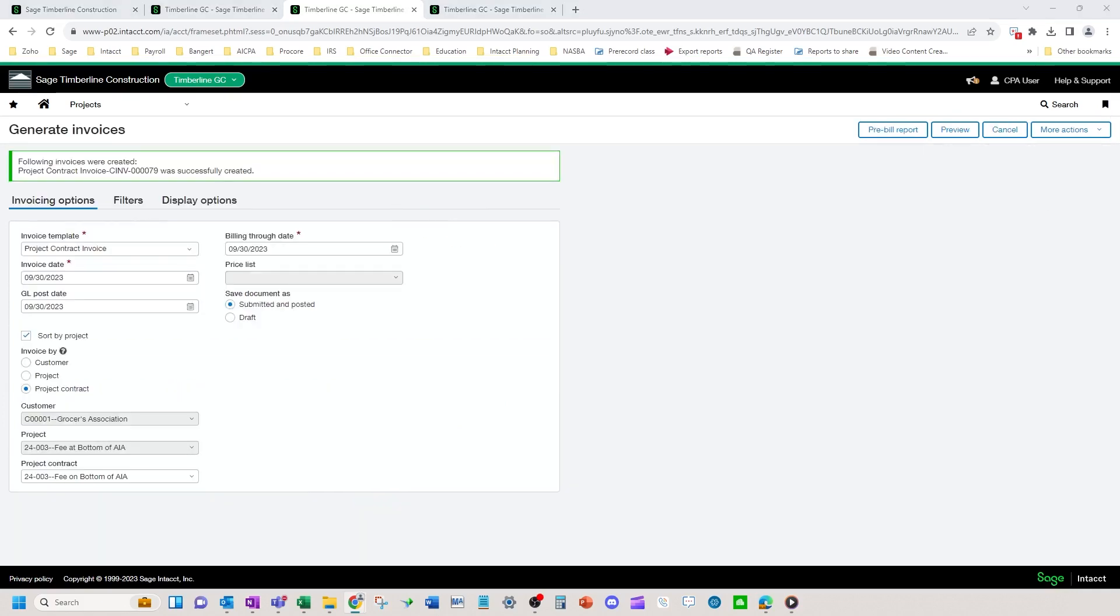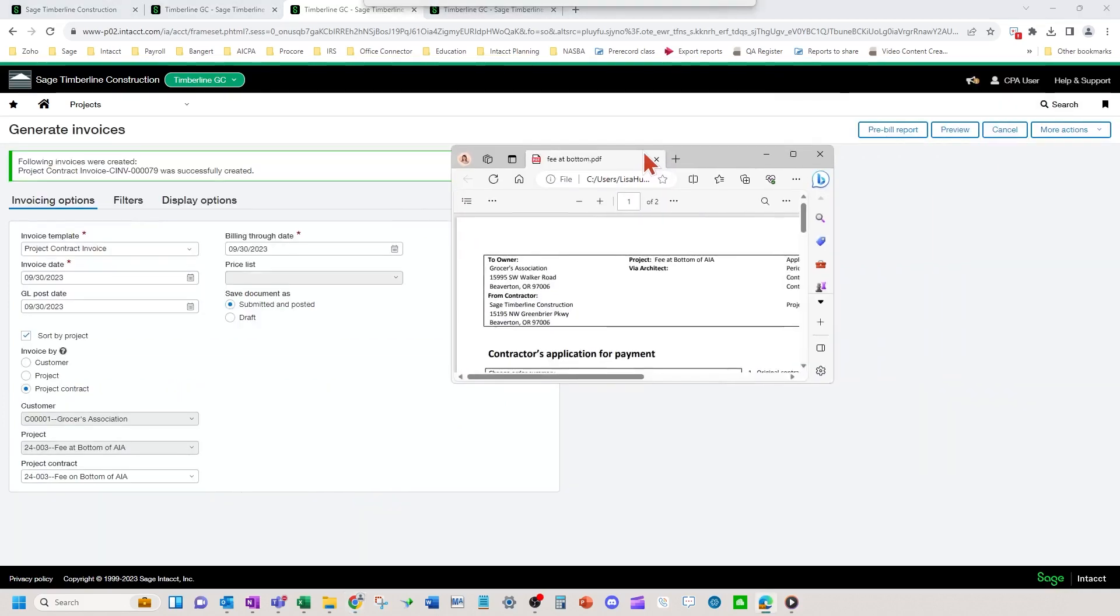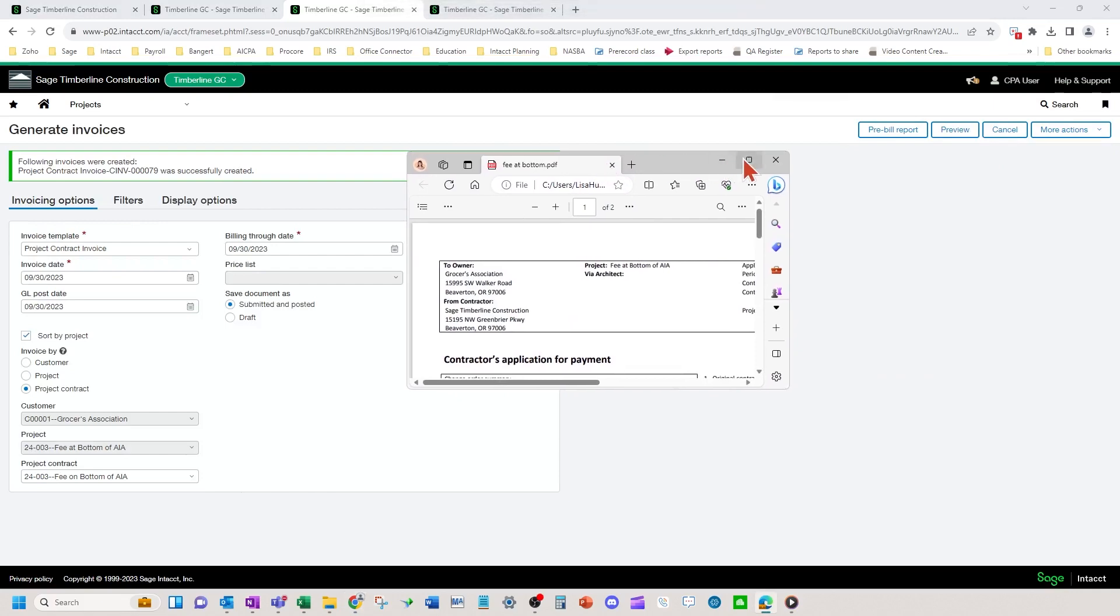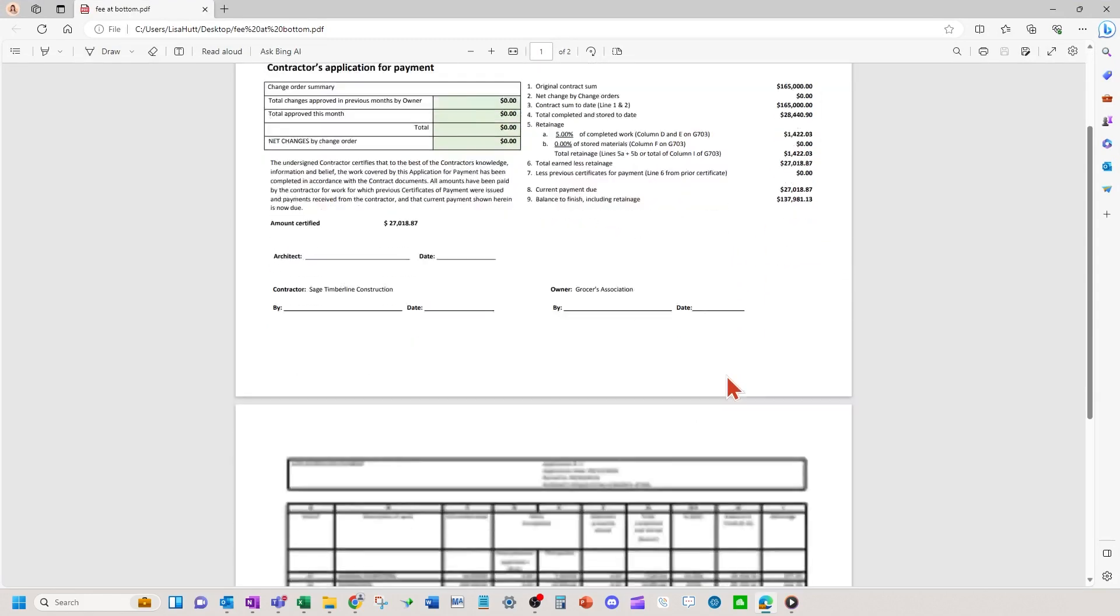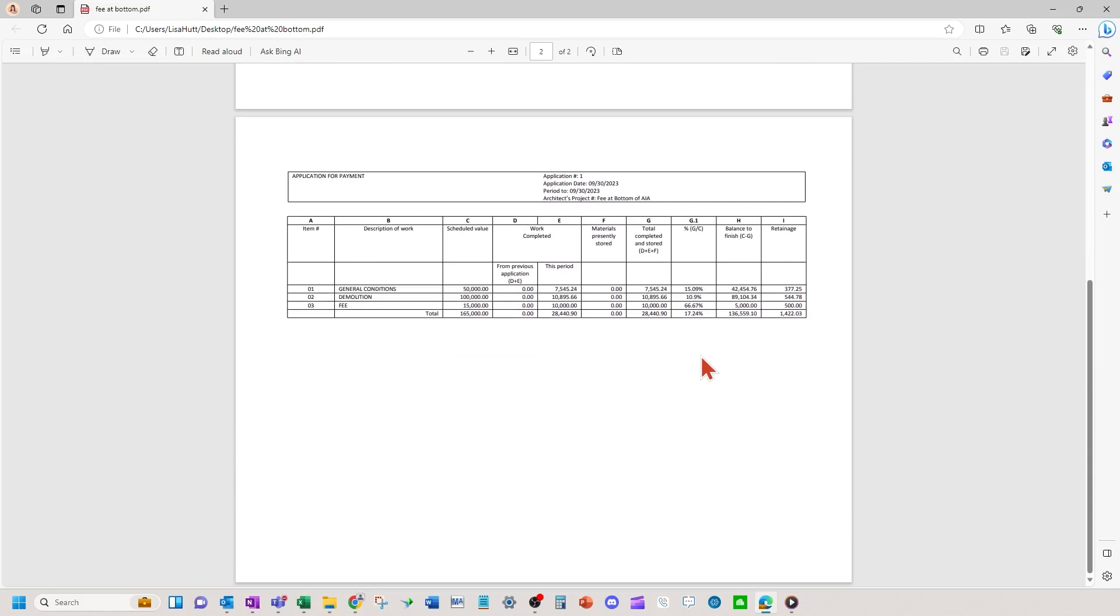And the output is going to look like this. So I've got my 18,440.90 plus 10 grand in fee. So 28 retainage. And we've got our line items down here with the fee at the bottom. Schedule values was 15. I billed 10, manually put that in and you get your schedule of values with the fee at the bottom.